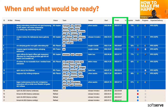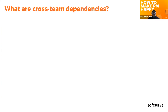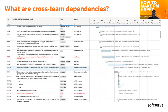The next question: what are cross-team dependencies and how can we see them? We have some working item, and we can see that — for example — item 117 cannot be started until items 115 and 111 are finished. This is visually represented, and there are also dates showing the possible start and finish dates for item 117.